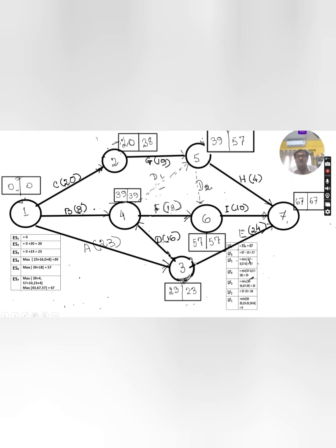It cannot be completed. You have to complete all the tasks. That's why we take the highest one. All the activities which are connecting to that node, you check the highest time for the different activities to complete.